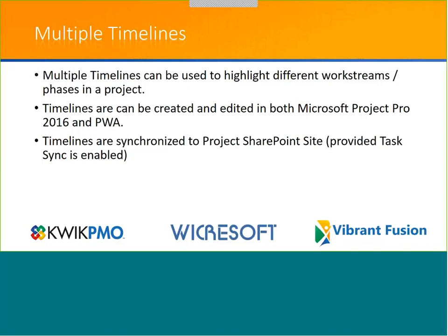The timelines can be created and edited in both Project Pro 2016 and PWA. Obviously, Project Pro 2016 is a little bit more user-friendly for the editing side of things, but you can do most of the functionality in PWA as well. One key point, too, for those of you that use your Project SharePoint sites, if you have your task sync enabled, it will synchronize the timeline down into the SharePoint site as well. So anybody using your project site on the SharePoint side will then be able to get updates on the timeline and see the latest timeline versions.